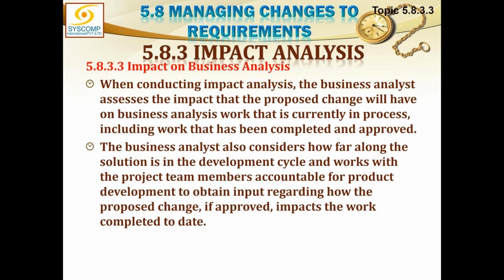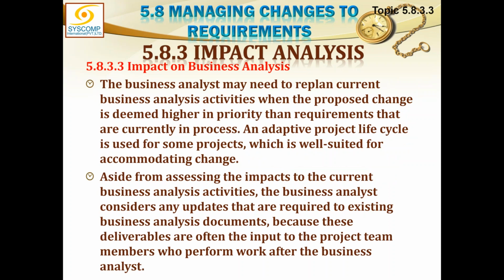Next is impact on the business analysis. When conducting impact analysis, the business analyst assesses the impact that the proposed change will have on business analysis work that is currently in process, including work that has been completed or approved. The business analyst also considers how far along the solution is in the development cycle and works with the project team members accountable for product development to obtain input regarding how the proposed change, if approved, impacts the work completed to date.